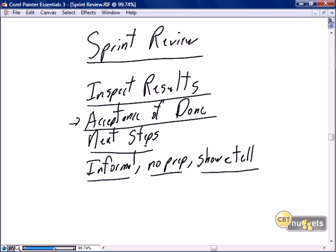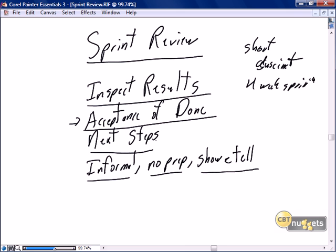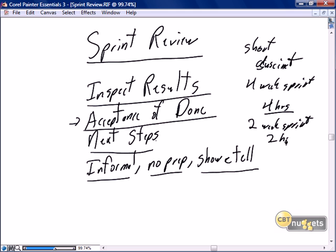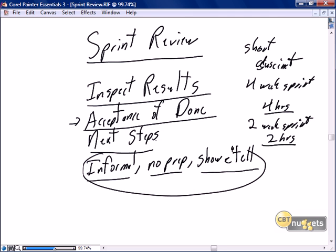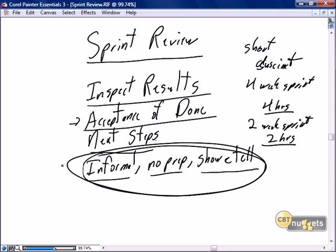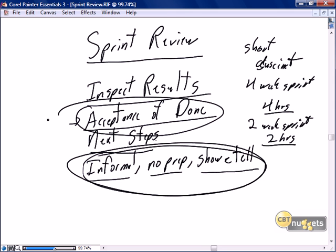What will be our strategy for the next sprint? The sprint review should be short and succinct. For a four-week sprint, it should take no more than four hours. For a two-week sprint, we should spend no more than two hours on inspection, acceptance of done, and next steps. We make sure that happens by keeping it informal and no-prep. It's critical because we need that formal acceptance of done from the product owner so we can take that story off the backlog and have total confidence that the story is done.